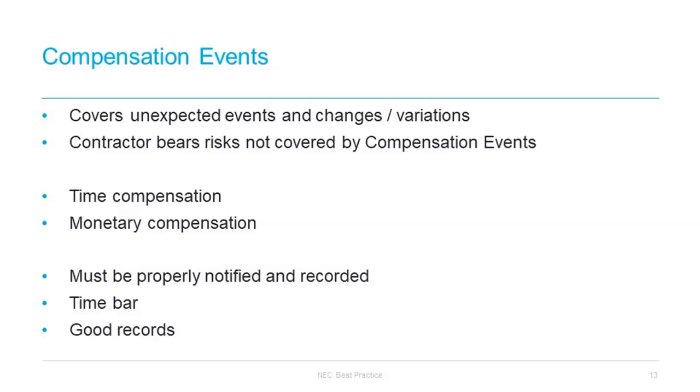It is intended that the quotation assessment process is done prospectively, either ideally prior to an instructed change or prior to an event fully materializing. In that case, the defined cost is an estimate of work to be done. Where work has already occurred, the assessment is of the defined cost of the works actually undertaken.